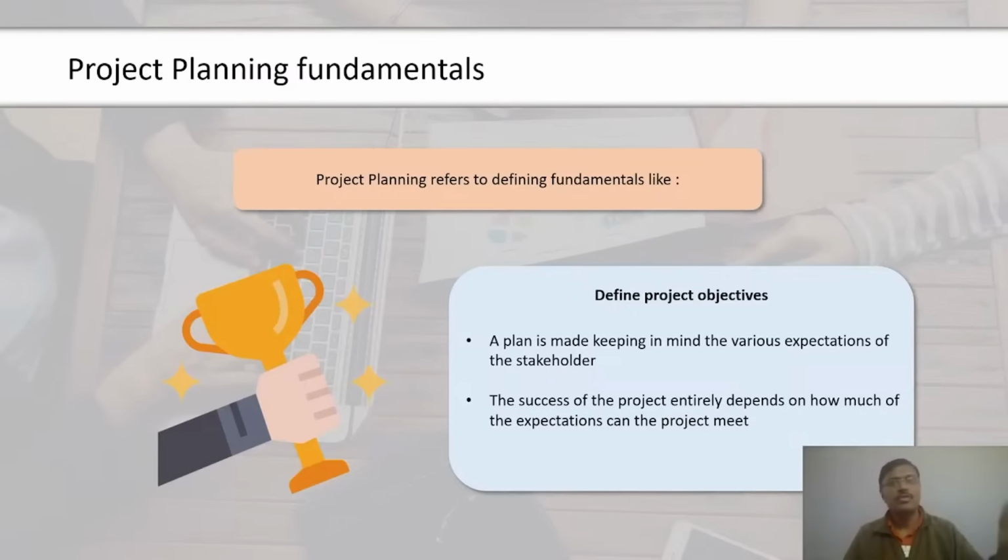However, you cannot keep on investing on increasing quality, as there is no limit to how much a product can be improved. Investment in quality is determined by knowing the optimal level of quality. Optimal level of quality, as shown in the diagram, is said to be achieved at the point where the incremental revenue from improvement equals the incremental cost to secure it.